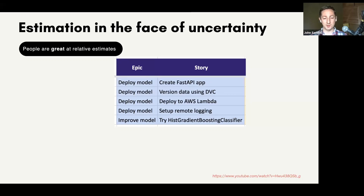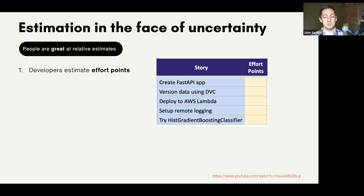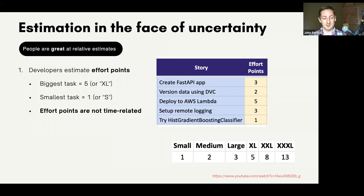The trick is that people are great at relative estimates. Here are some stories we might work on: some around deployment and trying a new LightGBM-style model now in scikit-learn. What we do is estimate effort points — also called story points, though I think 'effort points' is more descriptive. An effort point is not time, it's effort, because someone who's been coding for ten years may be faster at building a FastAPI app than someone just starting. You all agree on relative effort. I recommend t-shirt sizing: small, medium, large, and if you have to go higher. You'll notice the numbering system is a Fibonacci sequence — 1, 2, 3, 5, 8, 13 — because as we go from large to extra-large, it becomes really hard to differentiate between 4, 5, or 6 points. It reflects the uncertainty of estimating a large task.